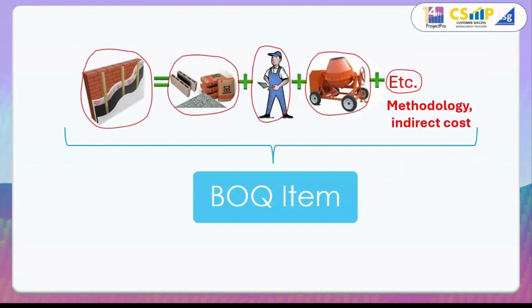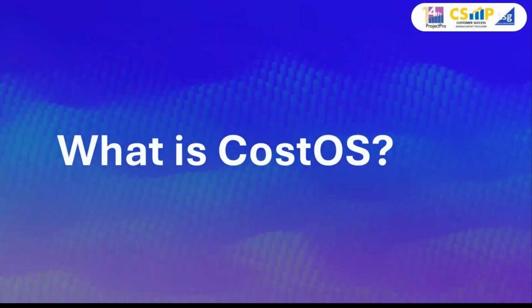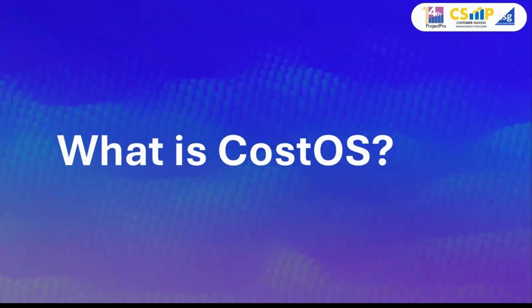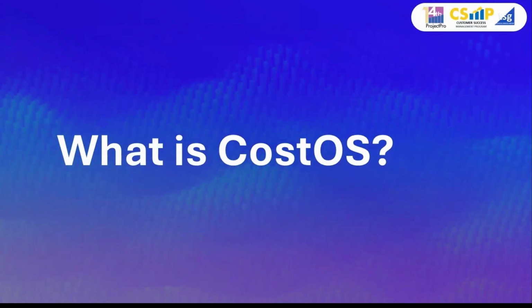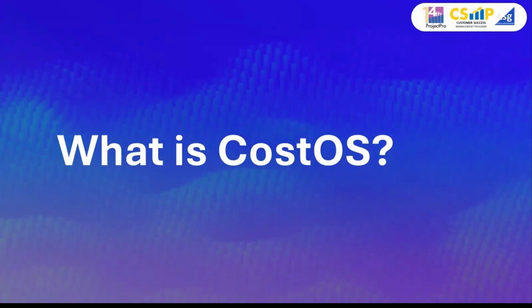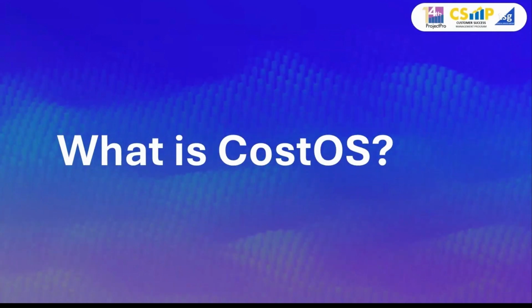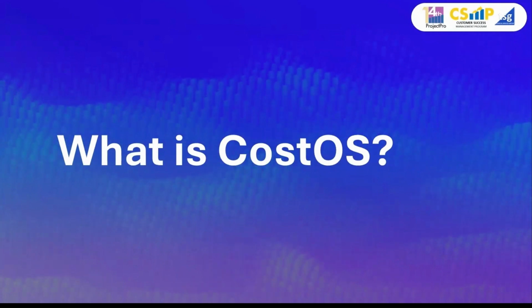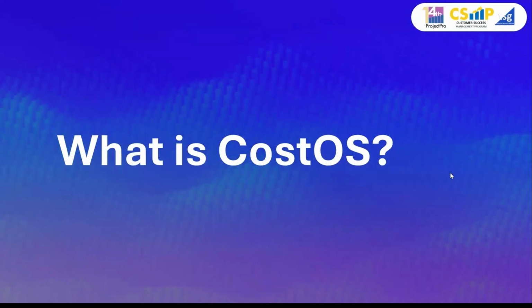And once we establish this, that is the moment wherein we are able to develop our BOQ line item. Doing this multiple times for the specific activities in developing our projects will then build our BOQ, or bill of quantities. All right. So how do we create this? Of course, doing it in a manual way, we need to establish specific material items and the scope of works. But we will jump right away to the applications that we have.